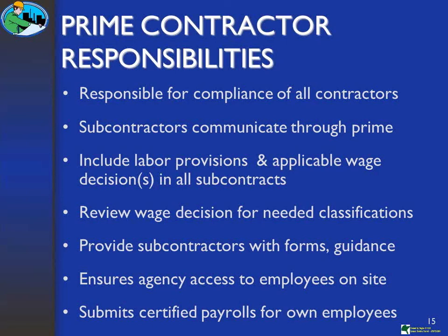And for CDBG projects, that labor standard provision is the HUD 4010. I think you probably are all aware of that. And then, of course, the applicable wage decision depends on the character of work, the construction contract that is being undertaken. Review the wage decision for needed classifications.